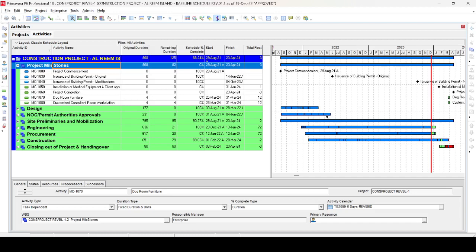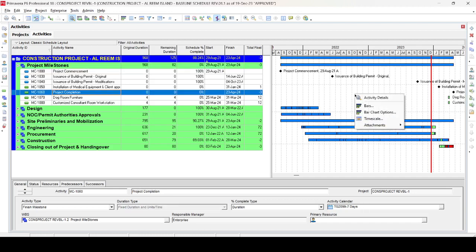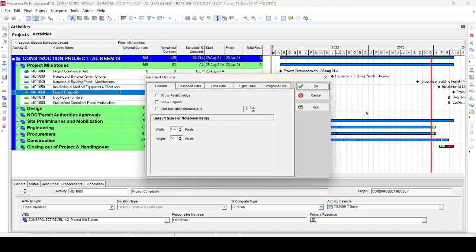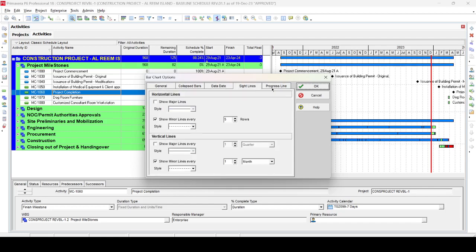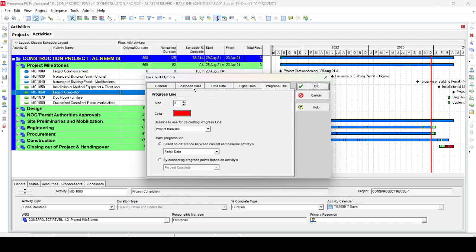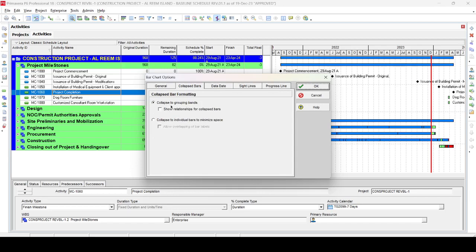Now we want to show the relationship lines for the summary bar. Right-click on the chart and go to Bar Chart Options. In the Bar Chart Options, you will find several tabs — General, Collapse Bar, Data, Data Date, Sight Lines, Previous Lines. Go to the Collapse Bar tab, select 'Collapse to Grouping Bands', and then enable the option 'Show Relationships for the Collapsed Bar'. Select this and press OK.